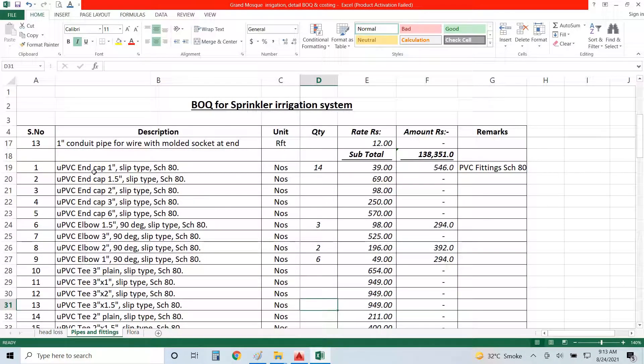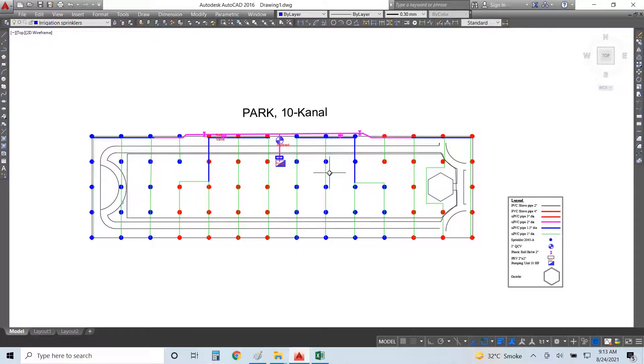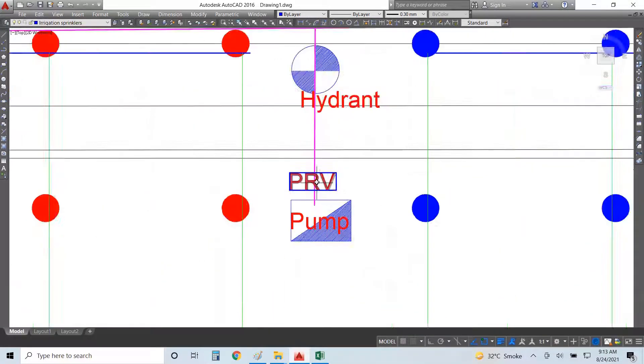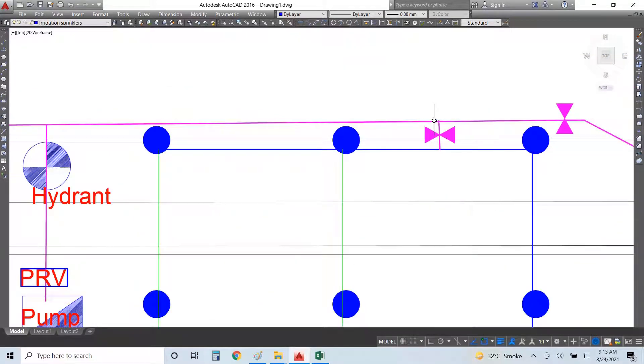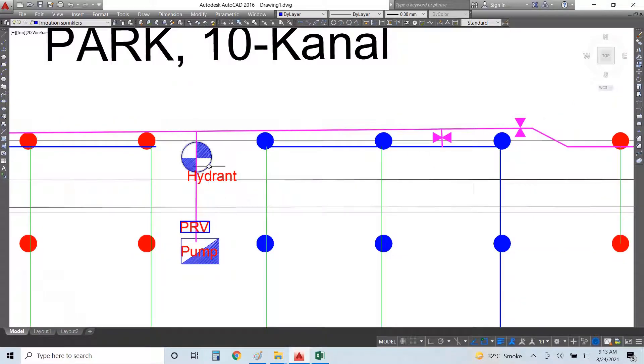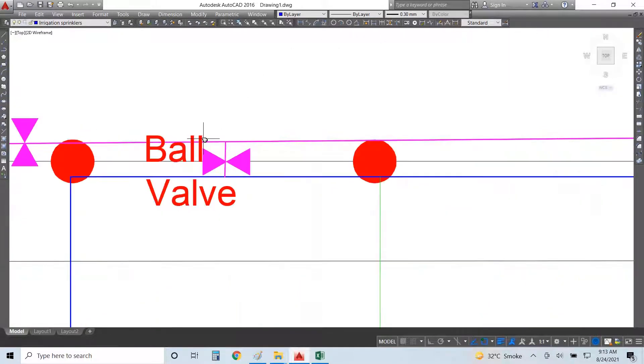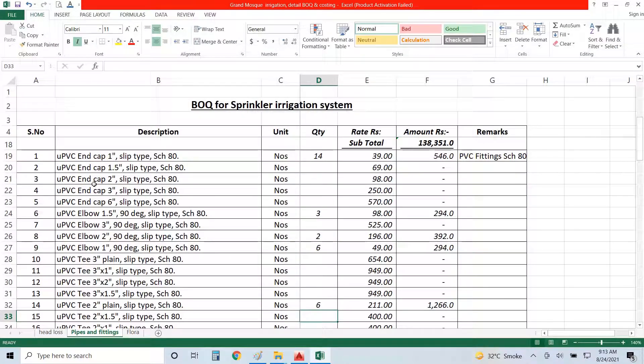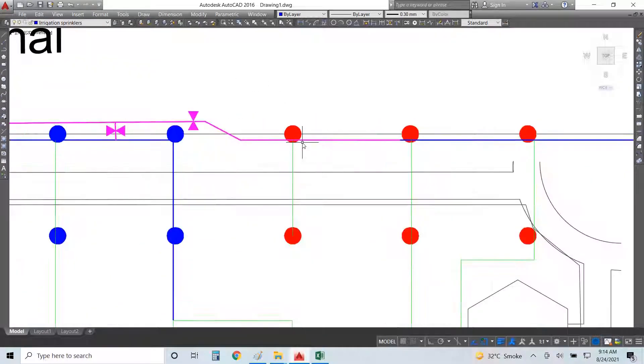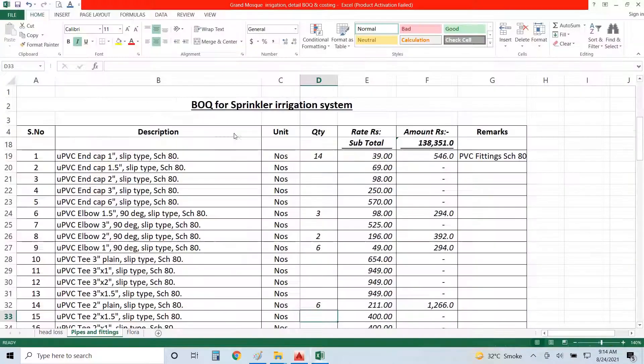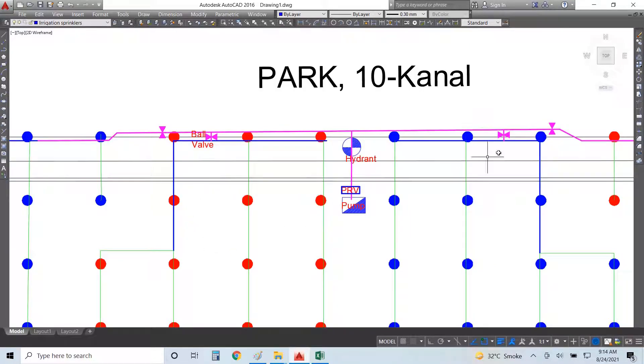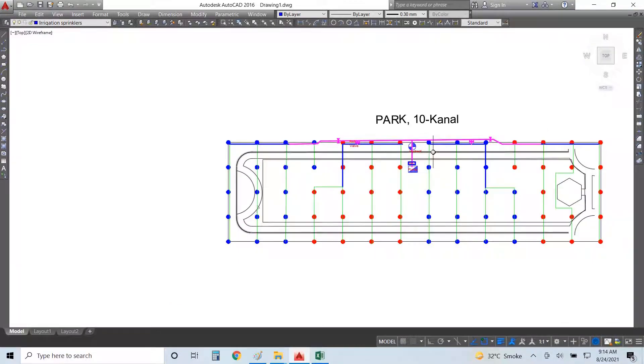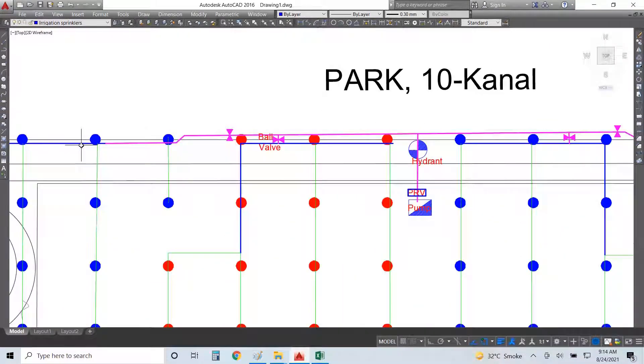Two-inch tee, yes, one here for pressure release valve connection I require, two, this is three. Here I will put 2-inch tee and reduce it to 1.5 and 1.5, so these 1, 2, 3, 4, 5, 6. I need 6 of these tees. Two and a half, not required. Two-by-one, yes I require, one here, one here, two, three, and that is the fourth one. Four tees I require.